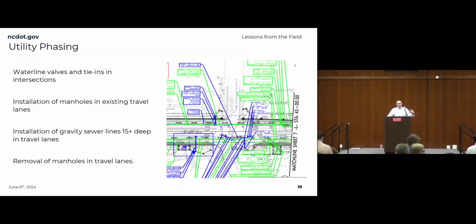And what happens is this overnight operation almost becomes a 2-day operation or a day-night operation. Again, we're cutting open, depending on the size of your line, and have to take an entire travel lane, if not more. So we start building in multiple ICTs, especially if you have multiple intersections like this.